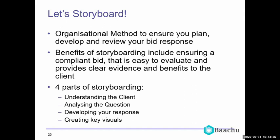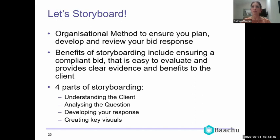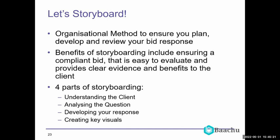Is storyboarding the same as creating a bid plan? Potentially, but they're separate principles. Bid planning is more around project management elements of bidding. For example, something that's part of a bid plan but not the storyboard is a compliance matrix and a deliverables matrix — though elements identified in those could be pulled into the understanding requirements element of the storyboard.